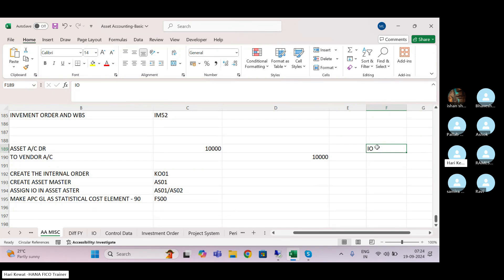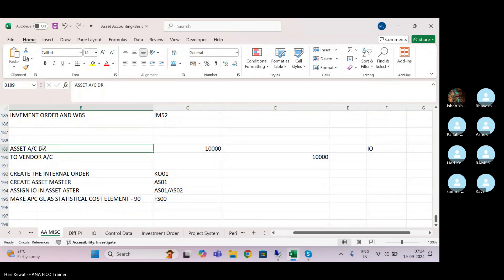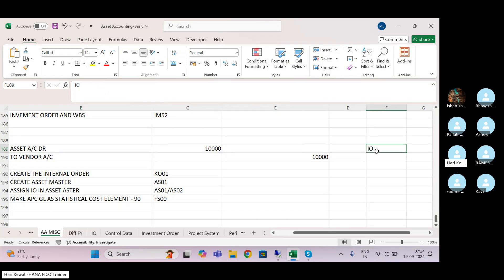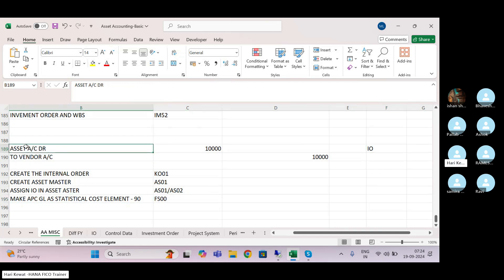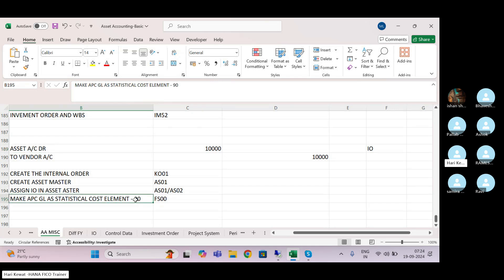Cost objects generally come through cost elements, but we normally don't create cost elements for balance sheet accounts — only for P&L. Here, however, you are going to control the budget at a balance sheet line item, and you want to derive the cost object — the internal order — there. So SAP provides a solution: make that particular GL a statistical cost element by choosing cost element category 90. The meaning of statistical cost element is that you cannot do settlement on it. Until you activate this, your budgetary control will not work.